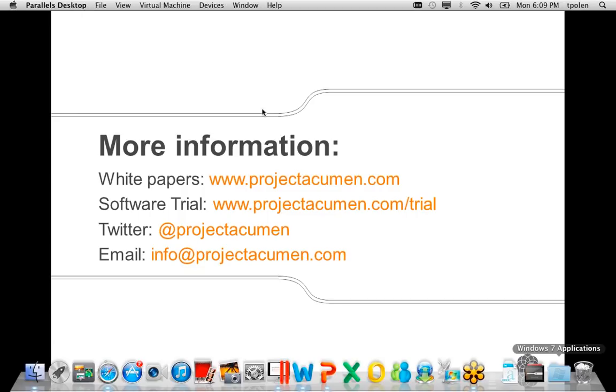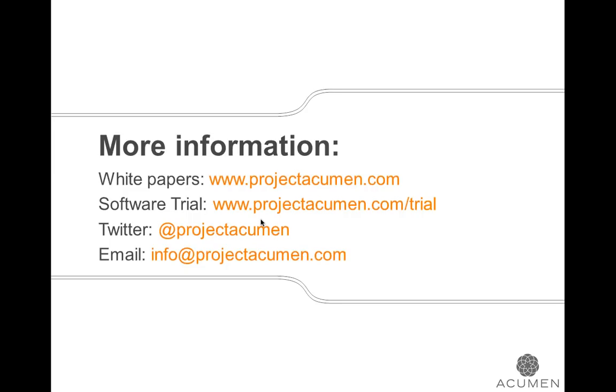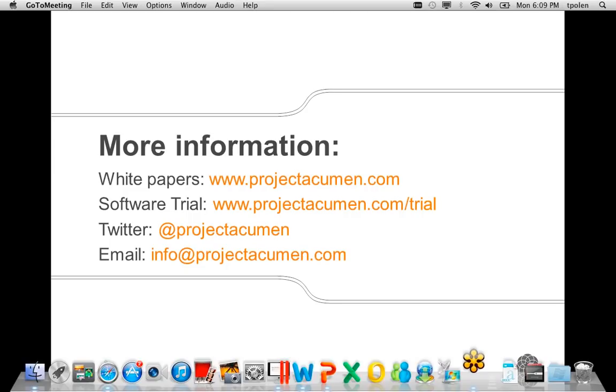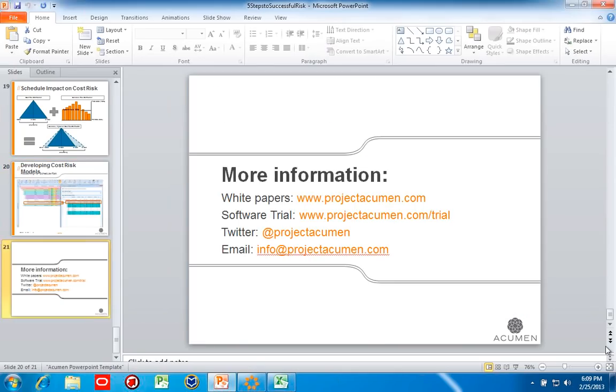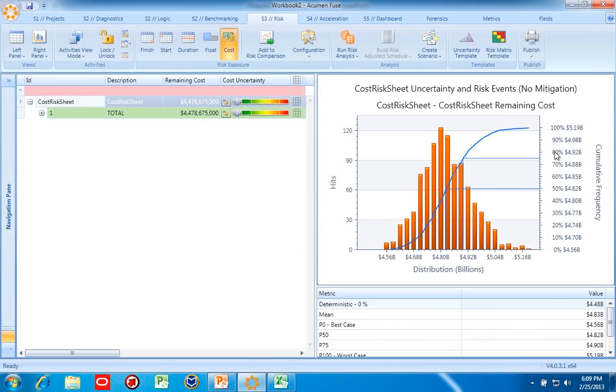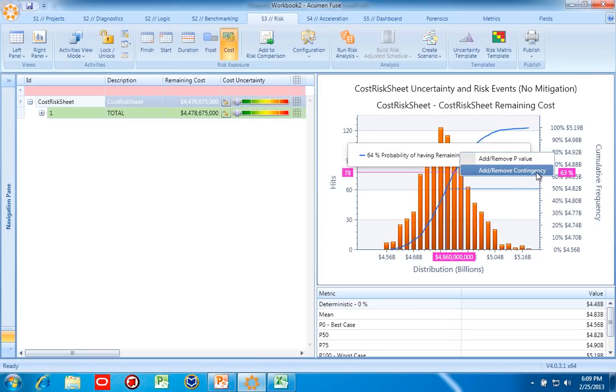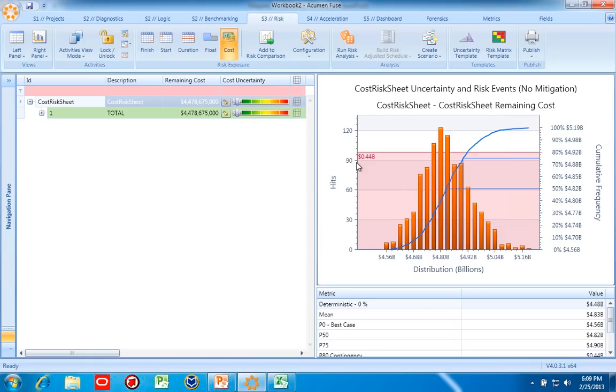Yes, let me get my mouse back over here. Hold on. Oh, I almost tried to leave the webinar. Hang on. Okay. Yes. The contingency, I can show add a p-value, and I can show the contingency at any one of those confidence levels. So at 80%, contingency is 0.44 billion. That was a question from Robert.